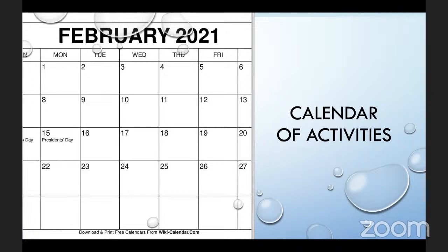So what do we do at that time? It's a new sprint, and of course, you don't have statuses. Sometimes you can have statuses because there might be stories that lap over between the two sprints. Maybe somebody didn't finish a story by the 12th, and when we come to the 15th for the sprint plan and kickoff of the new sprint, we might ask for the status of that issue still pending in the bucket. So there might be 1 or 2 statuses, but typically all statuses for the previous sprint should have ended. And then a new sprint will kick off.